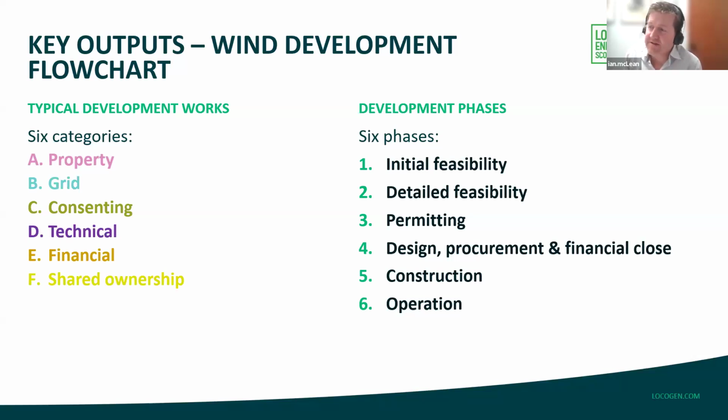The permitting stage is primarily there for securing the planning consent, which is a major hurdle for any development. We then move into the post consent stages, the design and procurement stages, where the project is looking to get to a point where we have a firm cost and a firm understanding of layouts and generation, and that allows the project to move towards and reach financial close or final investment decision.